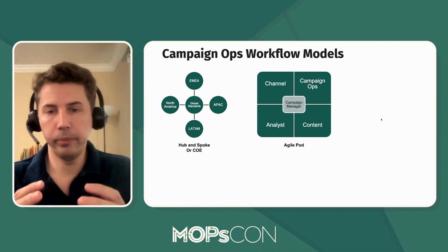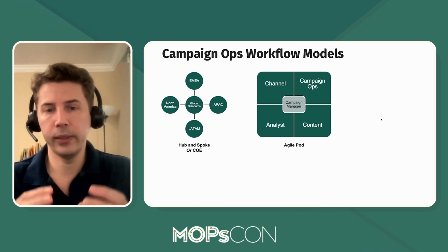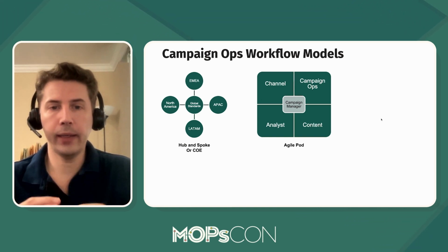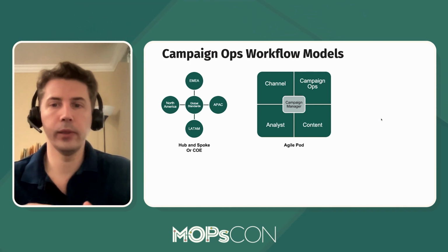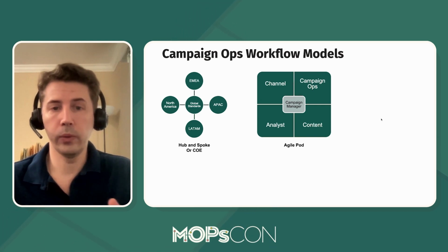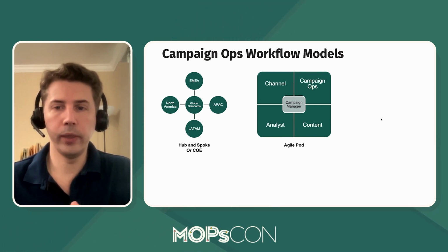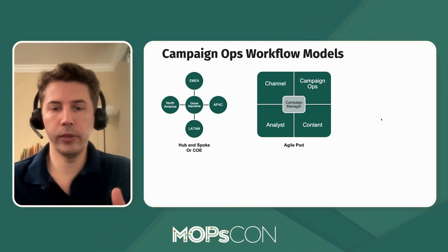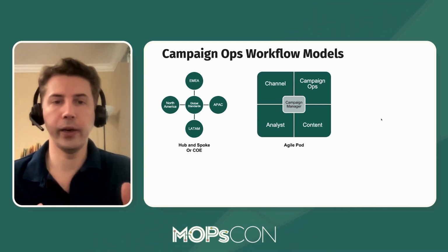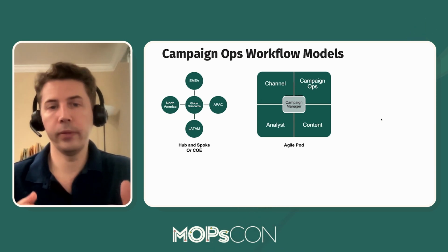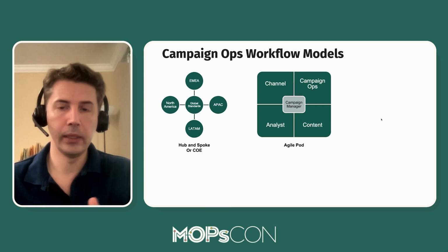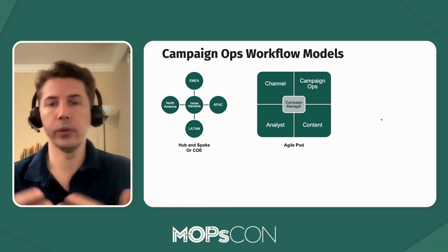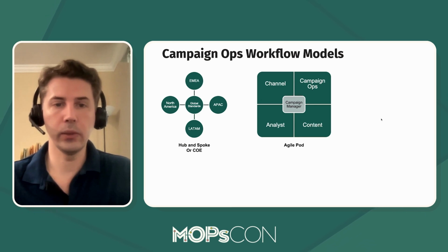Now, the campaign builder needs to build a platform essentially for testing and iteration, but that's dependent on the content. Where Agile is really great is it can help you be more responsive to the marketplace, do more real-time marketing. Where you may realize there are challenges is you shouldn't be rebuilding the platform of that journey every day or every sprint. Executives will often confuse Agile with speed or capacity changes. Agile doesn't necessarily make you go faster. It just helps you reprioritize more frequently. It also doesn't change capacity. You still have the same number of people and points or things you can do.